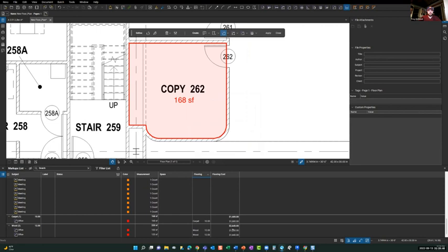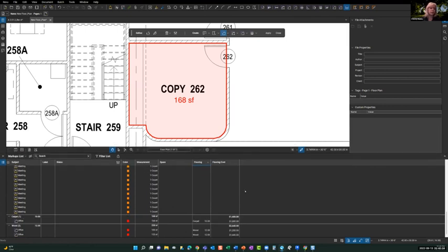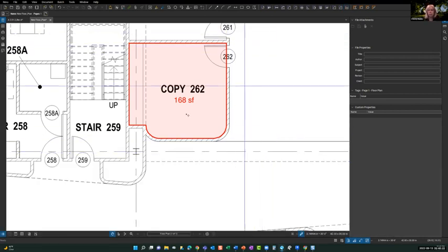And then here you can see the total for each room and the total for wood. And you can see the total here. That's almost like a game changer. I don't know if sometimes our partner has their estimator in here as well. But typically they would export out all the markups and then put it in Excel and do all the pricing separately in an Excel spreadsheet.